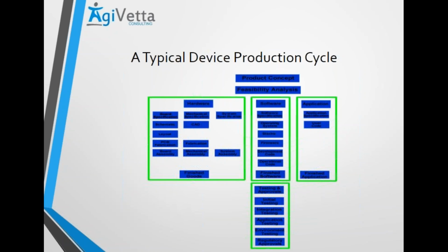But when we talk about a hardware design, we are talking about physical devices, we are talking about boards, we are talking about involving a manufacturing unit to fabricate, assemble and then test those assemblies. So how do we solve the challenge? Because typically, software design might be hardly a 3 to 4 month job. But whenever we come to the turnaround cycle for hardware, it will last anywhere between 6 months to 1 year. So how do we solve this dilemma and the challenges which are faced during the hardware design?